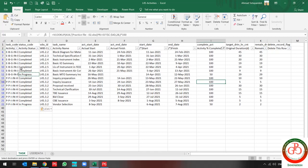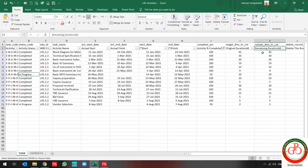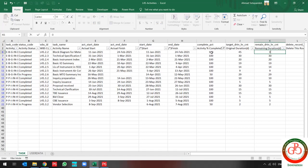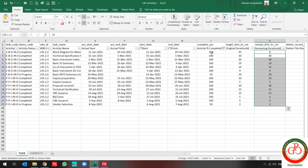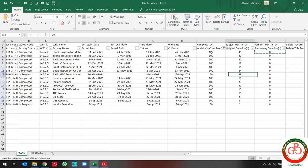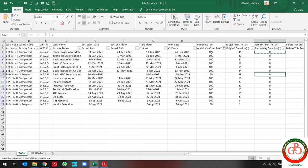So after this, if you have some updates you can do it. According to the project rule, the remaining duration for a 100% activity should be zero, so I change them to zero. And then I'm going to update for 15% remaining duration.